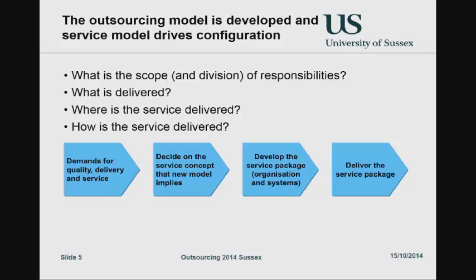Are you asking them to provide a service desk, the service desk personnel, the software that runs on the service desk? Are you providing the location for where the service desk is located? Will it be the only service desk within your company? How are you going to jointly manage the costs of the service desk down? And believe me, on all of those last five or so items I just mentioned, I can point to examples where that has not been sorted out up front.